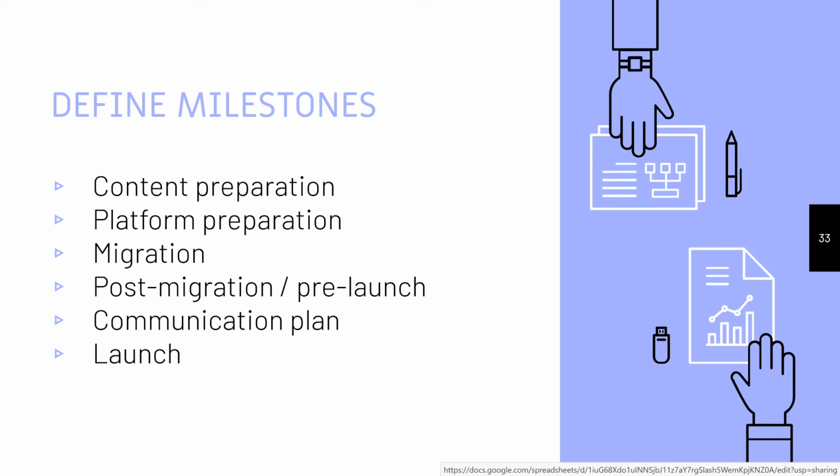Thanks. And then your migration plan. Who's doing the migration work? What is your plan? What is your timing? And then don't forget quality assurance, so testing your data once it's in the new system. Does it look correct? Do searches work? That sort of thing.